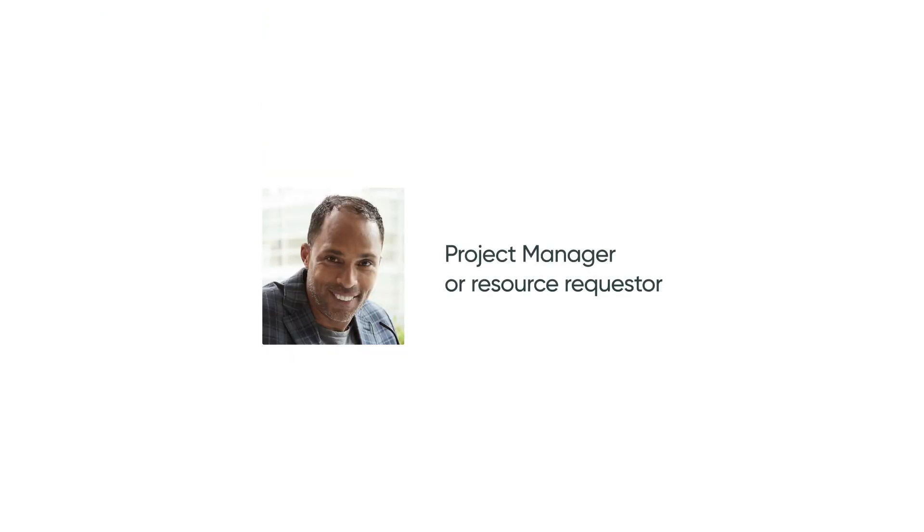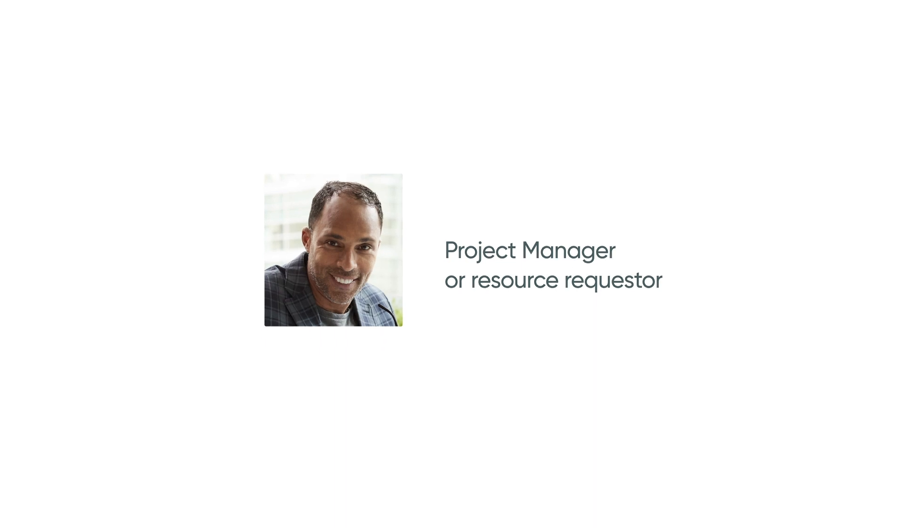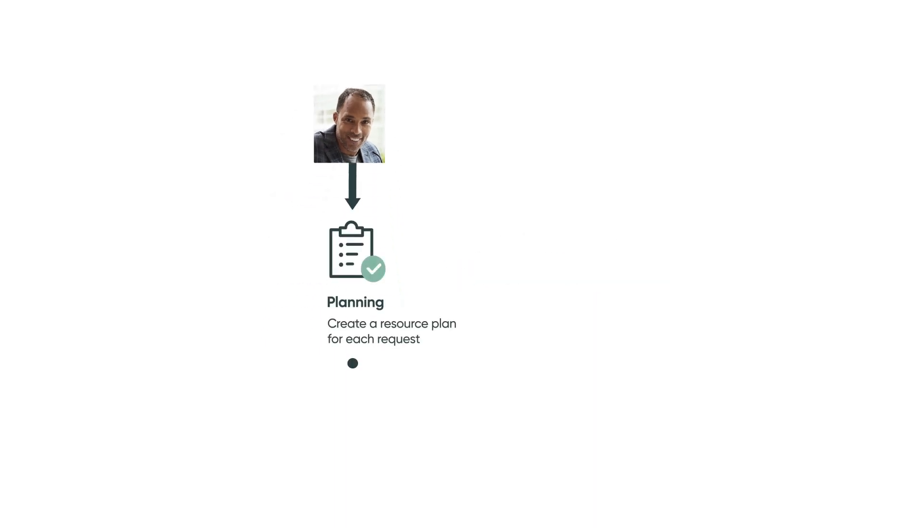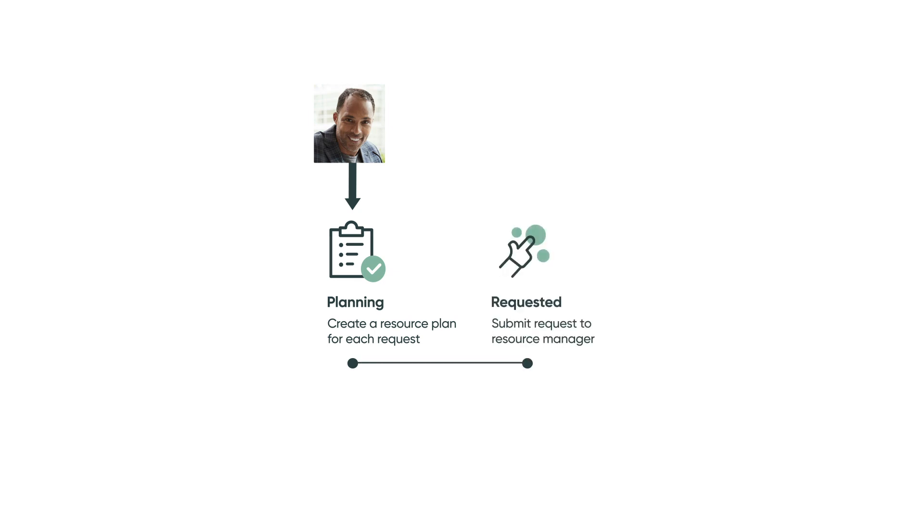If the project manager, also called the resource requester, has this information, they can create a resource plan for each request. When the resource plan details are finalized, the project manager will submit the resource plan to the resource manager.